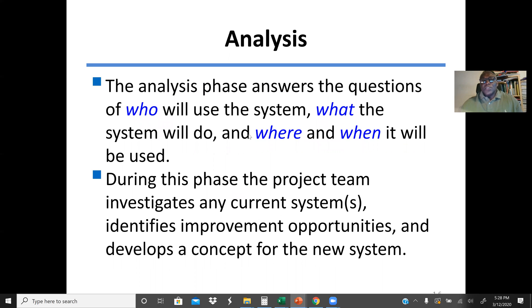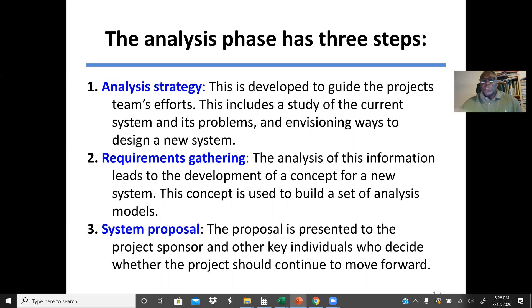In the analysis phase, we answer questions such as: who will use the system, what the system will do, where and when it will be used. During this phase, the project team investigates any current systems, identifies improvement opportunities, and develops a concept for the new system. The analysis phase has three steps: first, analysis strategy; then requirement gathering, which is one of the most important tasks in the whole process; then the system proposal.